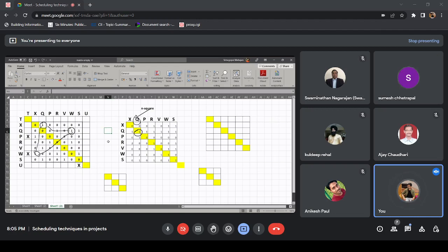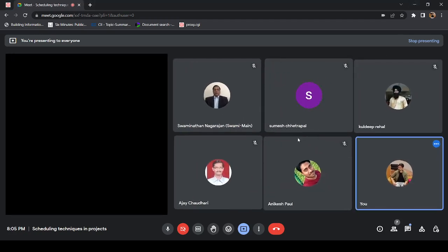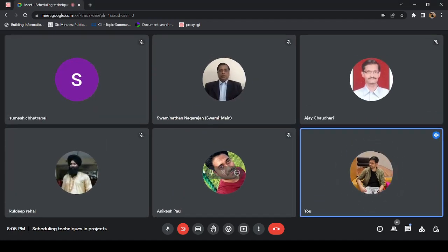So what we got is one starting point, one block. I mean, we made QXW, and again we cannot partition it. So we will again square it and go on till we can finally get some partition matrix, or we can make active blocks out of this. Are you getting this point?